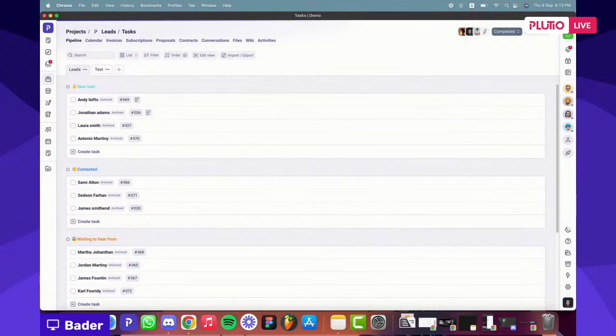One of the repeated bugs that we faced repeatedly was that people's teams and clients can't see certain tasks or task boards. It is basically because the permissions or the level of access is set to off by default.